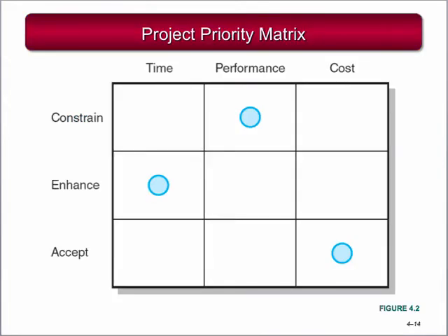Developing a decision priority matrix before the project begins is useful in that it provides clear priorities with the customer and top management. It creates shared expectations and helps to avoid misunderstandings. It's essential to the planning process where adjustments are often made to scope, schedule, and budget.